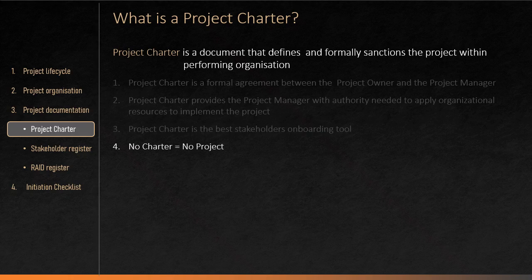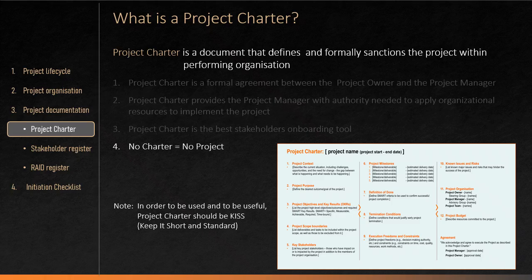And finally, the rule which professional project managers follow is that no project should exist without a project charter. A unique temporary endeavor undertaken without an approved project charter is not a project, it's an adventure. To be useful, a project charter should be KISS, or keep it simple and standard. Ideally 1 or 2 pages and based on a standard template. An example of such a PowerPoint template is shown on the screen.